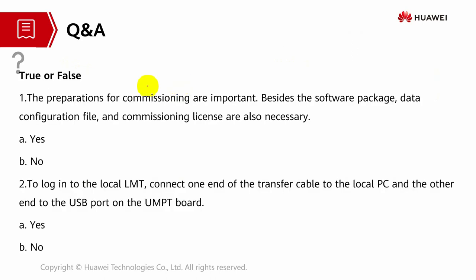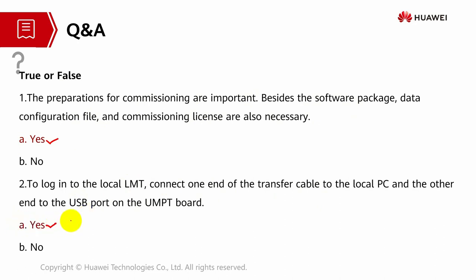Q&A time — true or false. The preparation for commissioning is important; besides the software package, data configuration file and commissioning license are also necessary. The answer is true. Second question: to log in to the local LMT, connect one end of the transfer cable to the local PC and the other end to the USB port on the UMPT board. The answer is yes, that is correct.